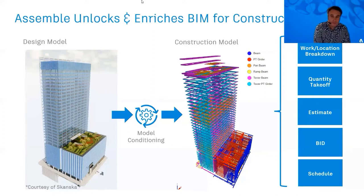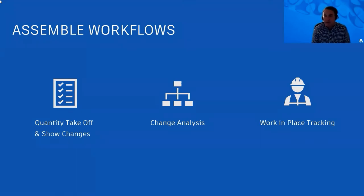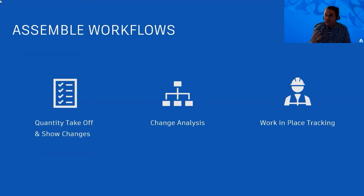Assemble also includes change analysis. Once you've done your quantifications and takeoffs from the base model, you can analyze change between versions. When you bring in a new version of the model, the unique IDs of the 3D model elements let you see what's been added, removed, or changed — and unlike a standard model comparison tool, you're also adding quantities to this. All the work done in your initial conditioning isn't lost; you can very quickly price up or quantify design changes.